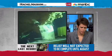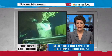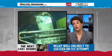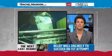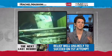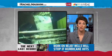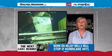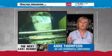And speaking on June 1st, at the start of hurricane season, in the event of a hurricane in this region, what happens if, say, the relief well is still being drilled? What happens if that slice and cap containment dome is still hooked up to a ship out in the Gulf sucking up the oil and a hurricane comes along? They have to move people off the rigs. I mean, that is just absolute protocol here in the Gulf for the oil industry. They have to keep their people safe. And so it would slow the whole process down and delay it even further.